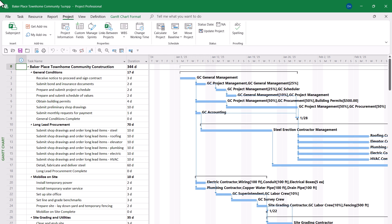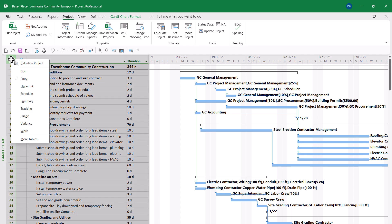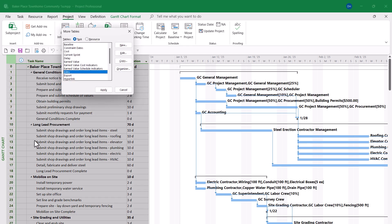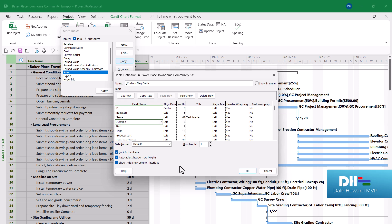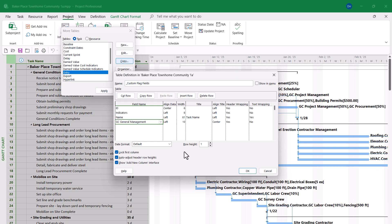The next step is to create a custom table that includes each of these custom fields. To do this, right-click on the Select All button and choose the More Tables item on the shortcut menu. In the More Tables dialog, select the Entry table and click Copy to make a copy of this table. Then give the custom table a name — I'll call it Custom Flag Fields. After the Name column, I need to delete each of the default columns, and now I'll start adding the custom fields. The first one is GC General Management. I'd like to align the data center, make the width of the column 15, and align the title center as well.